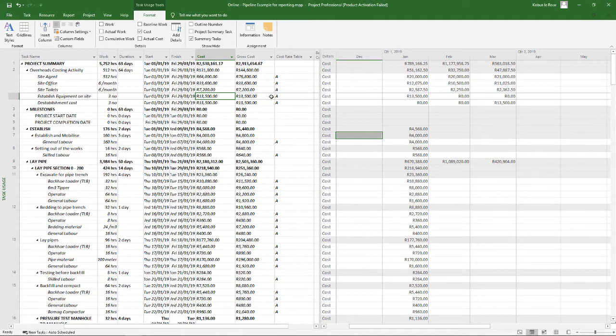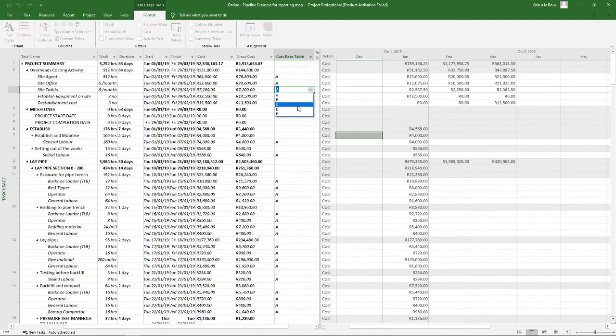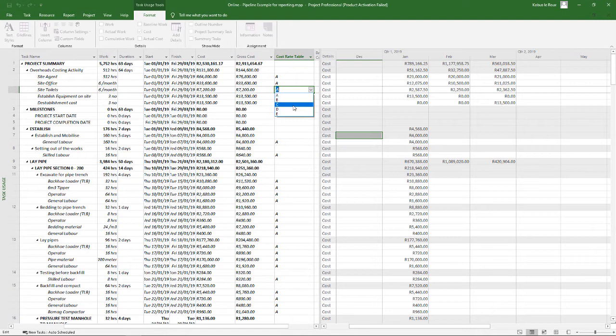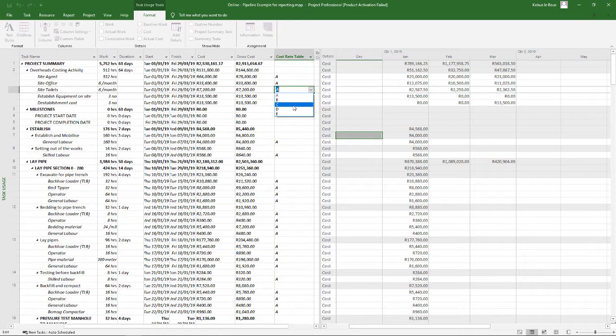I think it's one of those tools that very few contractors actually use or know about. And I've seen contractors actually have all these rates filled in depending on the type of project that they're going to look at. So already they made provision for specific technical difficulties, or they know the engineer is a difficult person, so they have got a C rate specifically for that engineer that allows a bit of risk or whatever.